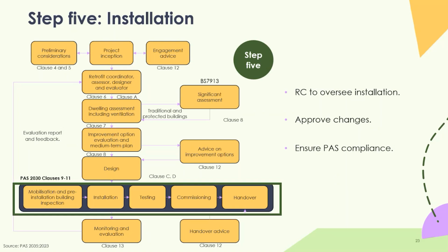Those certifications do need to be checked by the retrofit coordinator. That's part of their job. And the main role of the retrofit coordinator is to provide oversight. Clerk of Works, a kind of project manager end to end, who really has the oversight of everything, making sure it's being done in a compliant way, and that all the correct steps are being followed.